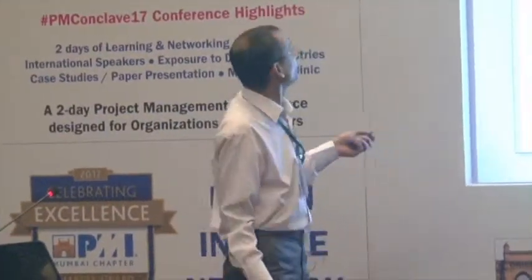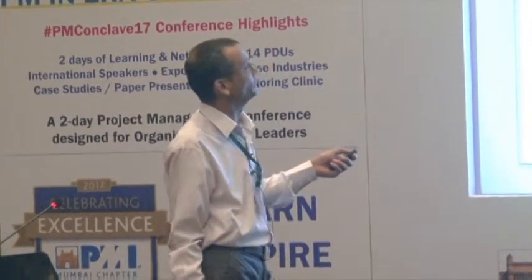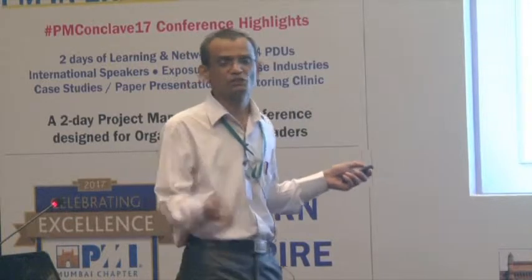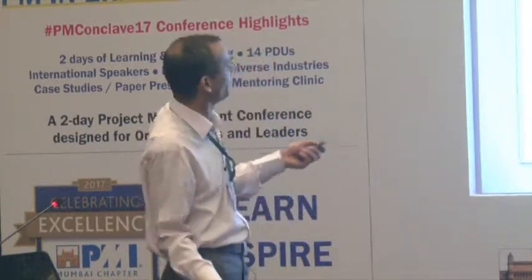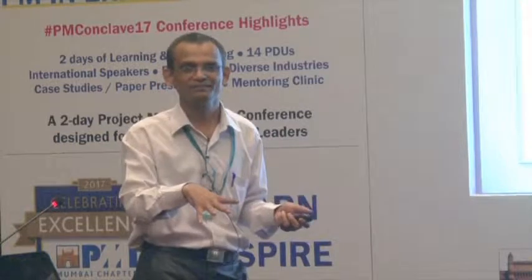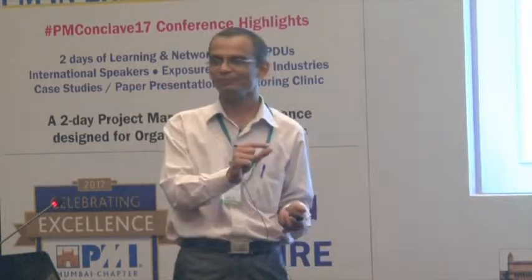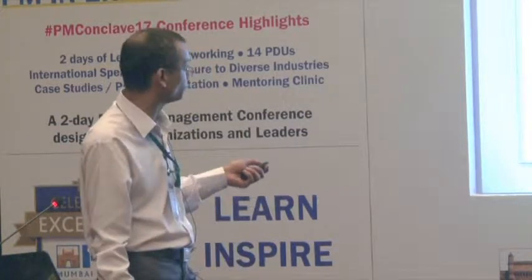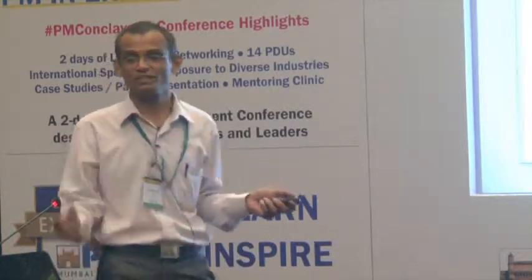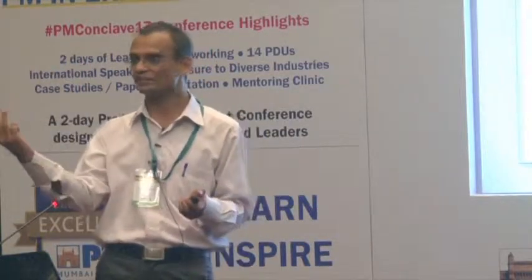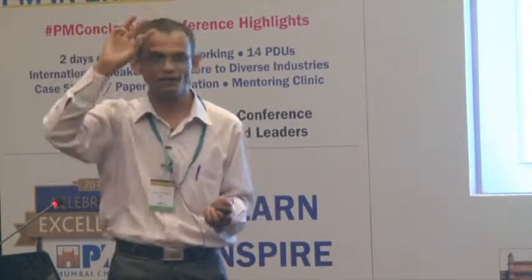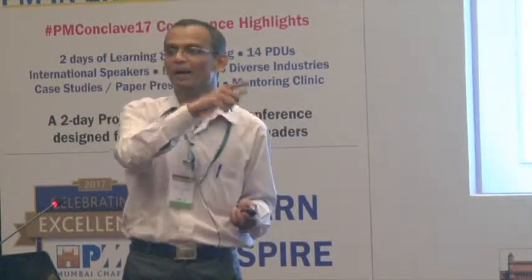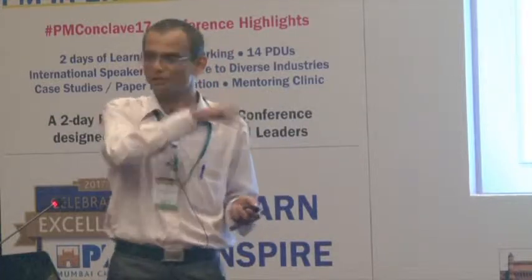So you can see here, the alpha is worked out based on B, M, and A. A is the optimistic, B is the pessimistic, and M is the most likely. It's just a way to convert; we could put A, M, and B directly into the formula. But in Excel, it becomes easy because the Excel function has been defined with alpha and beta. Otherwise, in the beta distribution, I would have to model this whole formula. So we are just transforming our three-time estimate into two parameters called alpha and beta, which are the statistical parameters of the beta distribution. And then that beta distribution is generating those durations for our scenarios.